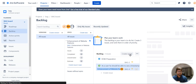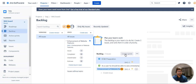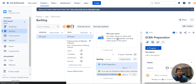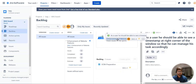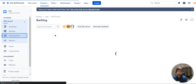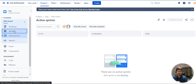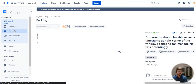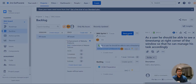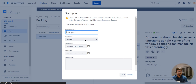I'm creating a sprint and dragging the story to the sprint. Now in backlog I can see the story under the sprint. When I click on start sprint — the duration is two weeks — I click on start.